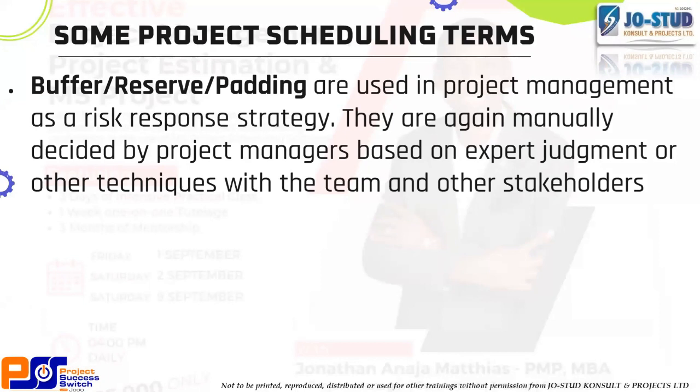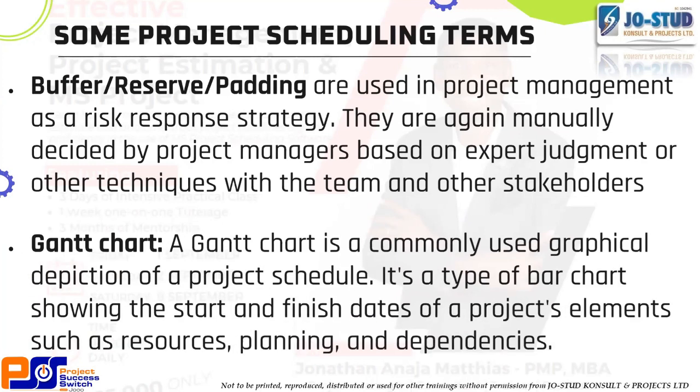Now, there's what I call buffers, reserves. Sometimes some people call it padding. So as a project manager, based on expert judgment and liaising with your stakeholders, you may want to create buffers and reserve. For example, I told us last time that when we're doing estimation, one of the ways to be safe is to assume that your masons can only work 80% of what they are normally supposed to work. Even if they are doing that 100%, that 20% is actually a buffer or like a reserve. Are we getting? Can we remember when I said that? So that's one way to put buffers on your project.